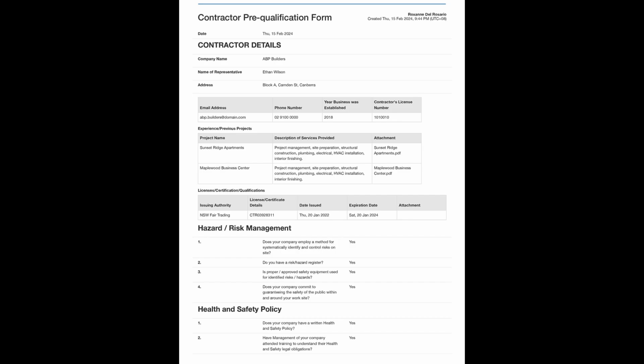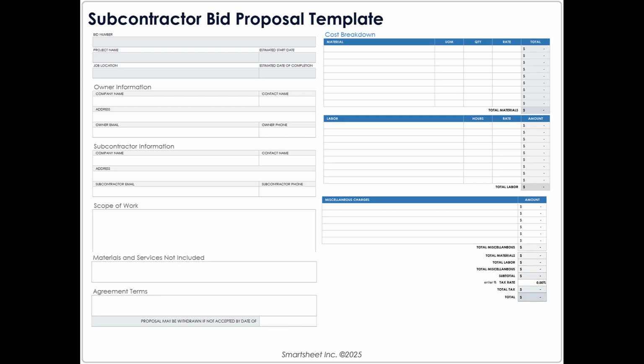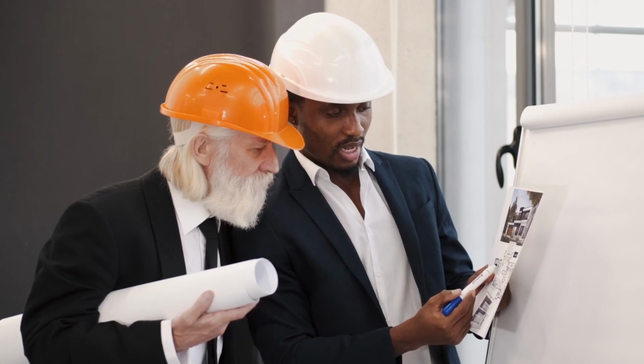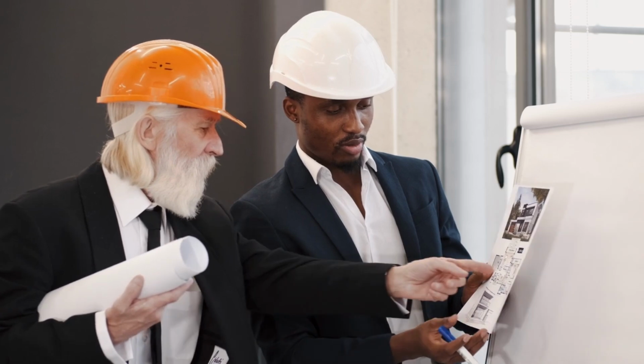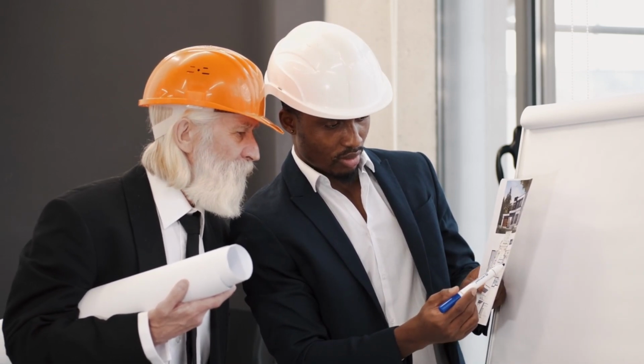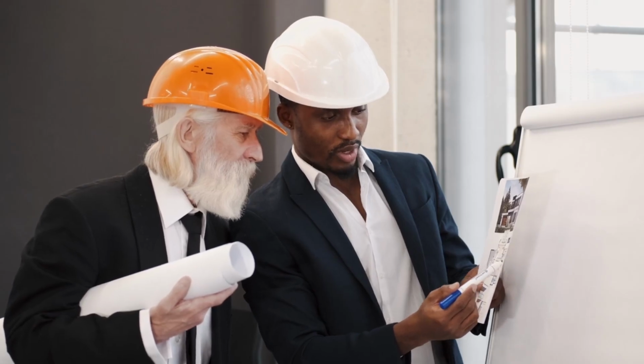Pre-qualification evidence showing capability, experience, and compliance systems. Lists of proposed subcontractors and key specialist trades. Personnel details or management approaches where required. Accuracy is critical because these schedules often form part of the contract. Commitments made at tender stage may be enforced later.